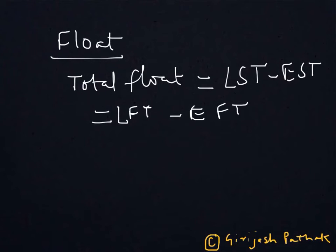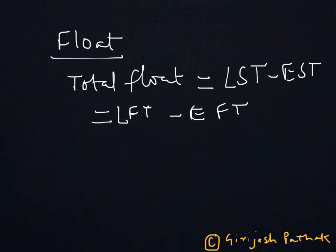For various situations some other types of float are useful. For example, if the situation is such that this activity cannot be delayed to the extent that the earliest start of the subsequent activity is disturbed, then there is a restriction that this activity cannot go beyond the earliest time of the next event. This kind of float is called free float.